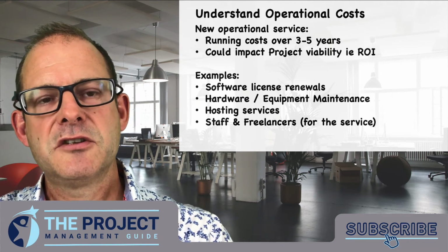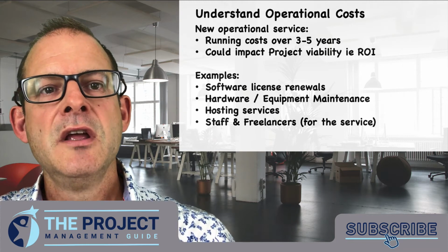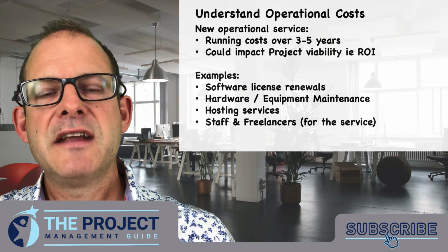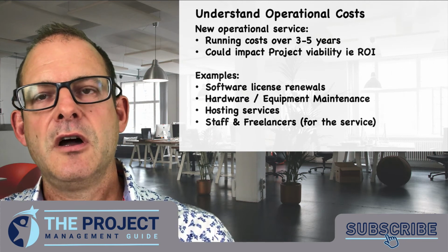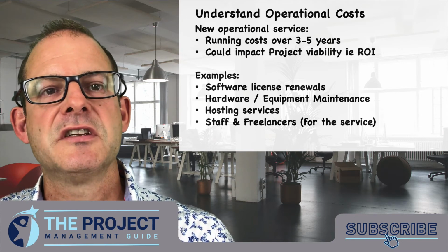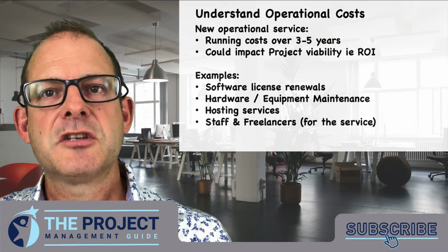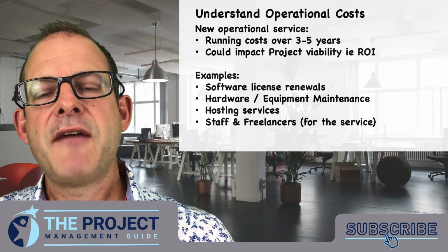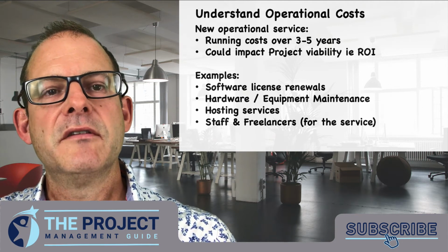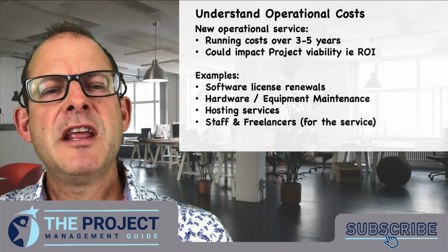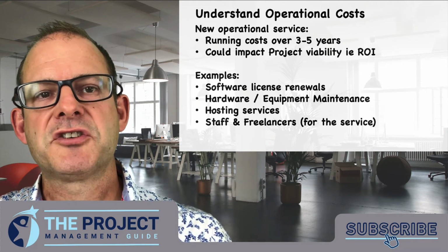And typically what we're looking at is the running costs for the first 3 to 5 years of the new service. And so the sort of things that includes are, it might be the renewal of software licenses, it could be the maintenance figures for hardware or some equipment maintenance, or it could be hosting services for some systems or something like that. Or you might even have an increase in staffing and freelancers required to run the service. So it's really important that we understand what those costs are.